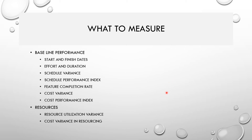Resource metrics include resource utilization variance — how many resources were planned versus actual capacity utilization. For example, are you maintaining 80 to 90 percent utilization, keeping variance below 10 percent? You also track the budget for human resources versus the actual resources being used, and the variance between them.